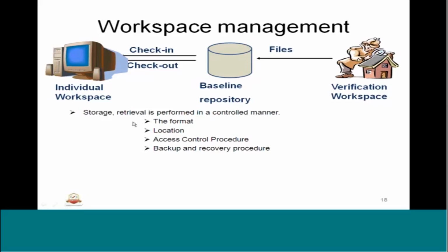Storage and retrieval is performed in a controlled manner. The format, location, access control procedure like writes and all that. Backup and recovery procedure. How are you going to back up and how are you going to recover? Suppose some file is deleted, we are going to recover it after we get an incident report from the individual or the users. So we will have a backup, and the backup will be used for recovery. All this will be defined in the workspace management.